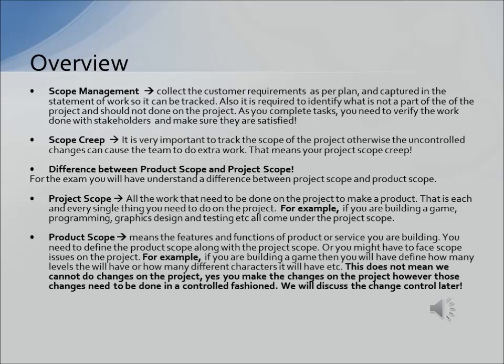As you complete the tasks, you need to verify the work done with stakeholders and make sure they are satisfied. It is very important to track the scope of the project. Otherwise, uncontrolled changes can cause the team to do extra work. That means project scope creep.